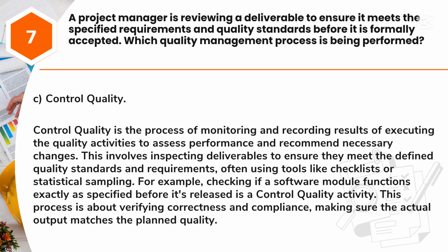Answer: C. Control quality. Control quality is the process of monitoring and recording results of executing the quality activities to assess performance and recommend necessary changes. This involves inspecting deliverables to ensure they meet the defined quality standards and requirements, often using tools like checklists or statistical sampling. For example, checking if a software module functions exactly as specified before it's released is a control quality activity. This process is about verifying correctness and compliance, making sure the actual output matches the planned quality.